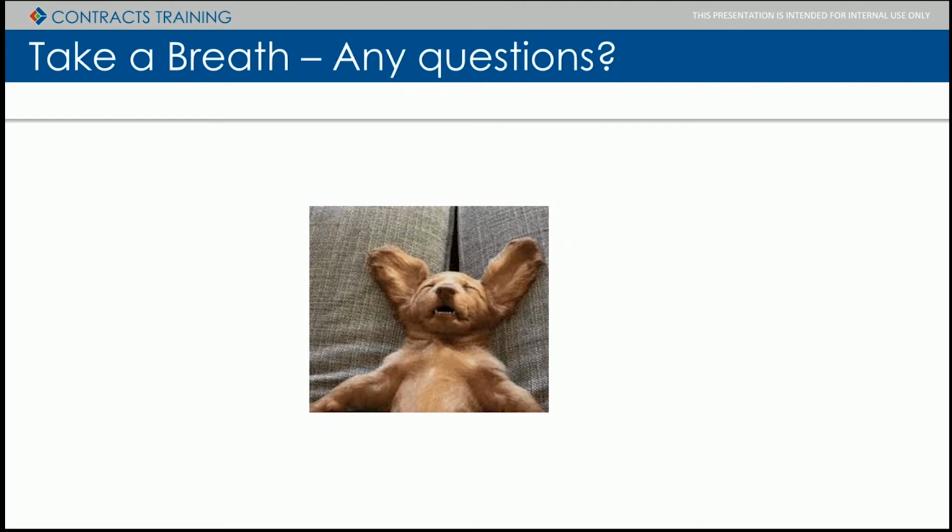The practical answer to the question is it almost always is identified which terms take precedent. And the other thing I want to mention and why it's a good question is that many times our standard terms and conditions will be accepted, which is a great thing. But then what happens is we get an invoice or some other documentation from the client, and they attach their standard terms and conditions, or it's part of their invoice. We need to be careful with that.